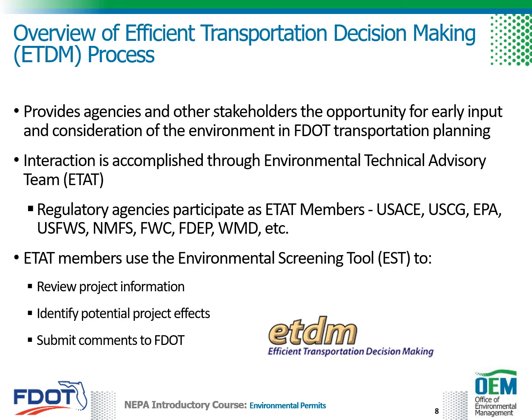The Efficient Transportation Decision-Making, or ETDM process, provides agencies and other stakeholders the opportunity for early input and consideration of the environment in FDOT transportation planning. In the ETDM process, interaction is accomplished through an Environmental Technical Advisory Team, or ETAT.